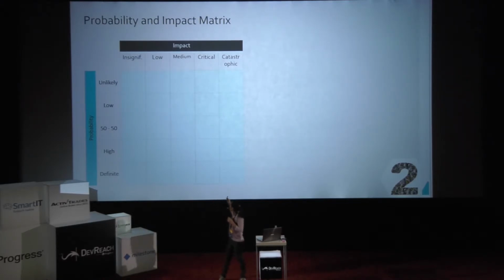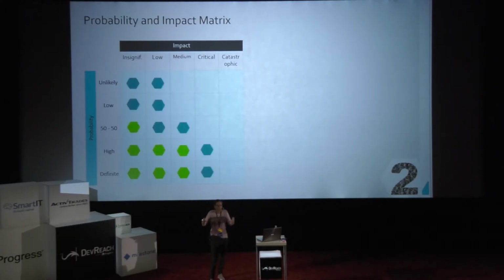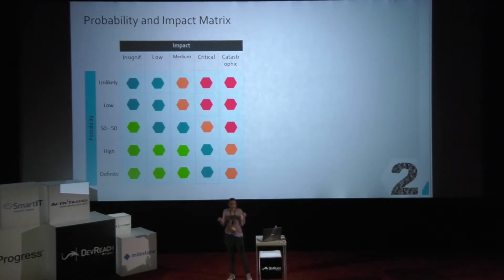But before we fill it in, let me just say what is missing: ranking. So we need to think about ranking the risks that fall into this matrix. The ones that have higher impact and a higher possibility of happening would have higher rankings. Now it's logical to conclude that those with a lower impact and a lower probability of happening will have lower rankings. And from these rankings, we can figure out the priority of our risk.